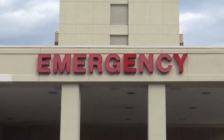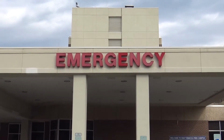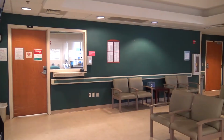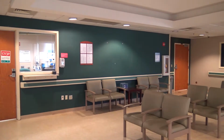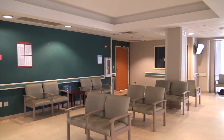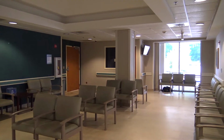Next month, a 10-week, $361,000 full finish upgrade of the Morganton Campus Emergency Department is scheduled to begin. The project includes significant modifications of the existing space, as well as new flooring, furnishings, painting, and signage. Here is Blue Ridge Capital Projects Director Deanne Avery.